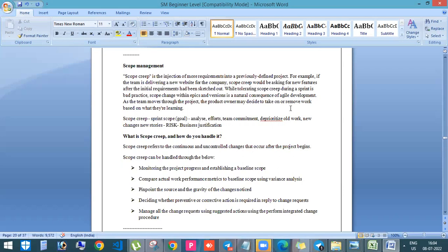If we want to change the story point, we can change it, but you need to check with the product owner, and you need to make sure that the relevant story points are removed. For example, if you are going to add a 3 story pointer, then a 3 story pointer which the team is already working on should be removed, right? That is the ideal way, correct?